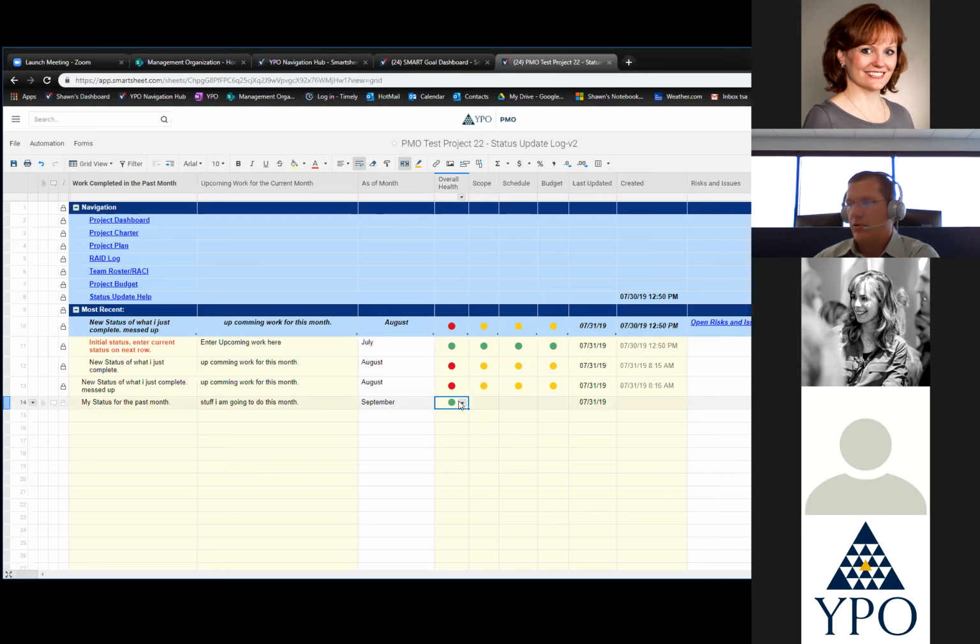So let's say we're green on that. This is all opinion, because they want to know the project manager's, the responsible's opinion of the project, not necessarily exactly what it says. So when we get to the schedule item, when we looked on the dashboard a minute ago, there were 6 late items. You could still say it's green here, but if you're late, you may want to put it at risk. You know, yellow, say, hey, I'm at risk on a few things.